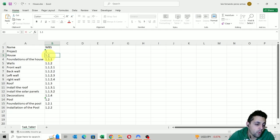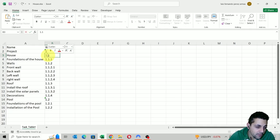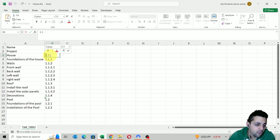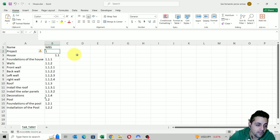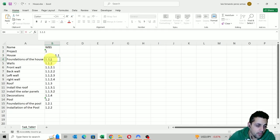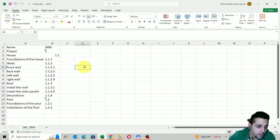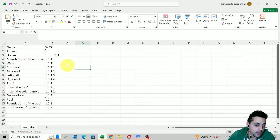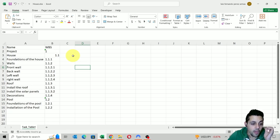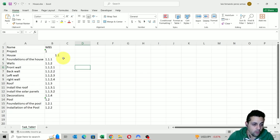We know that the last dot is telling us the new level for the activity, and all of the values to the left of the last dot are actually the parent of this activity. So for example, this is activity 1.1 — the parent of this activity is just 1, which is the project. The same situation here: for the foundations of the house at 1.1.1, if we stop at the last dot, the parent is 1.1, which is just the house. So we need to do a lot of things in Excel to extract this information, step by step.